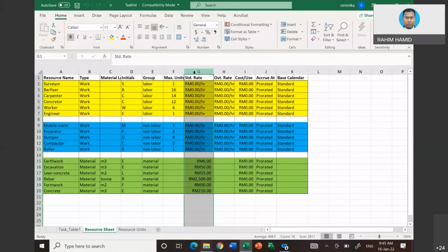But if you do that, most of the time, if you input the items according to specific unit rate, all the items here do have unit rate, including the material, man and machine. Well, trust me, you are going to end up with your total cost being more than what is in the tender or contract documents.